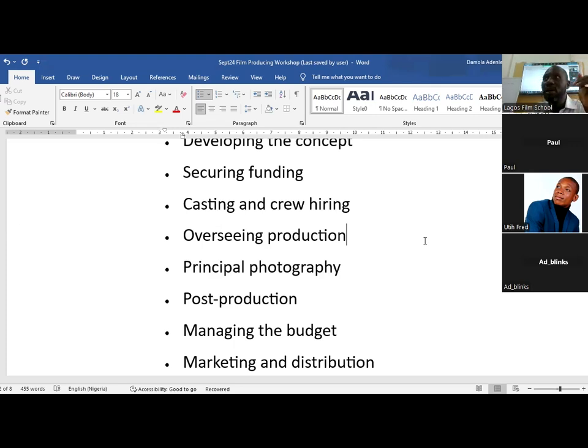10 days they budgeted. By day 8, it was obvious they were going to need another 5 days to finish this. How many days does that mean he will spend on location? 13 days. Yeah. How much did we say one day roughly equals to? 350K. How much extra does he have other than 3 million? 500K. How much does he need for the 3 days extra? About almost 1 million. Let's even dash the 50K. He needs 1 million. He has how much? 500K. Do you think that film is going to finish?